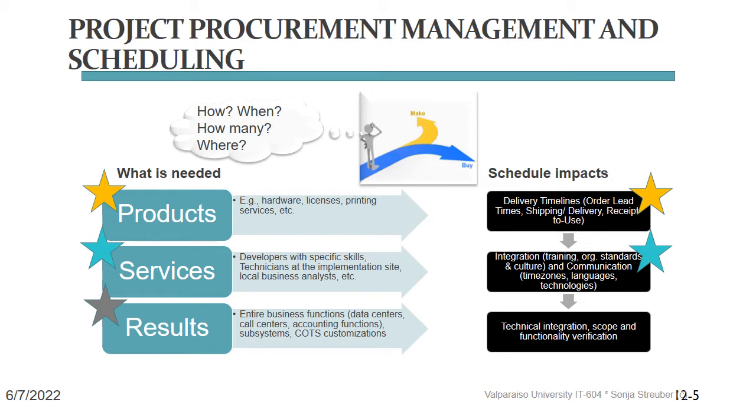If you are in the second situation I have just described, waiting for your weekly progress updates can be a nerve-wracking, nail-biting component to your job. No matter what though, once the subcontractor solution is delivered, it needs to be thoroughly integration tested to ensure that no parts of the delivery clobber anything in your production system.